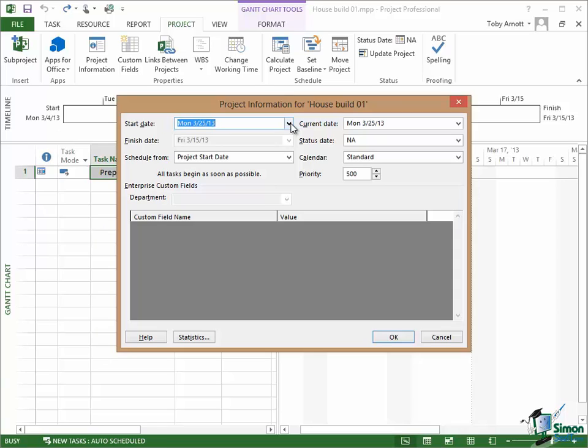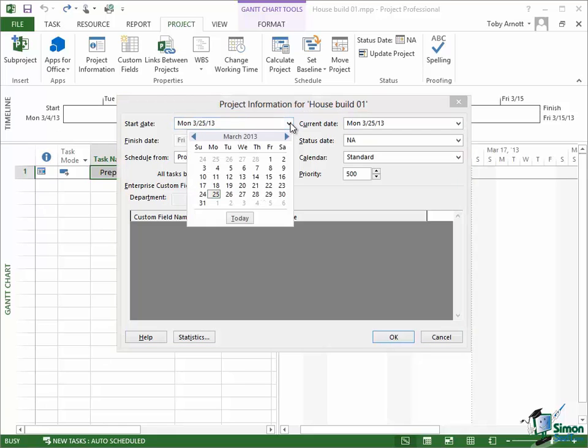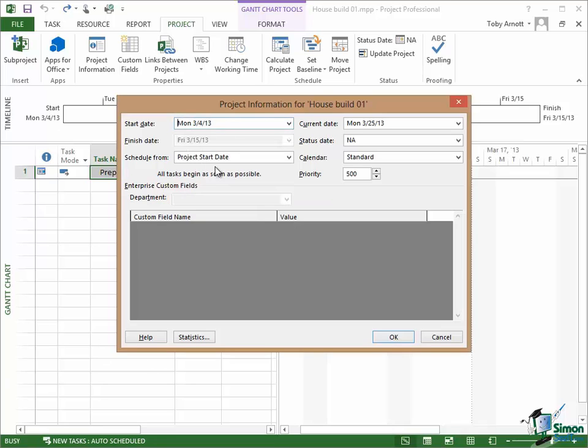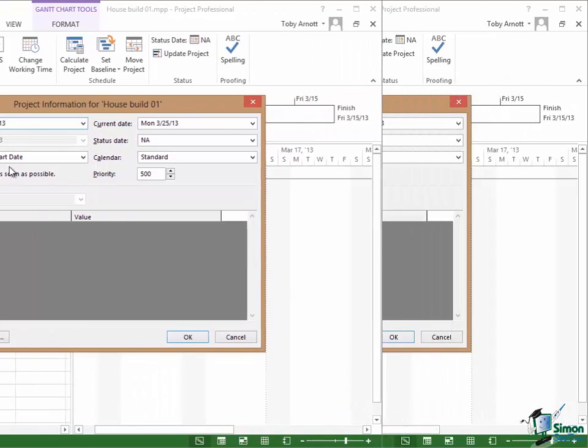Now it might well be that you really want to set a start date in the past because hopefully you're planning your projects for some time in the future. But whether it's the past or the future, it's absolutely fundamentally important that you set the start date correctly. So let's click on the drop down here, use the date picker, and we're going to set the start date to March 4th which is where I scheduled that first task to begin. So click on that and my start date is now changed.